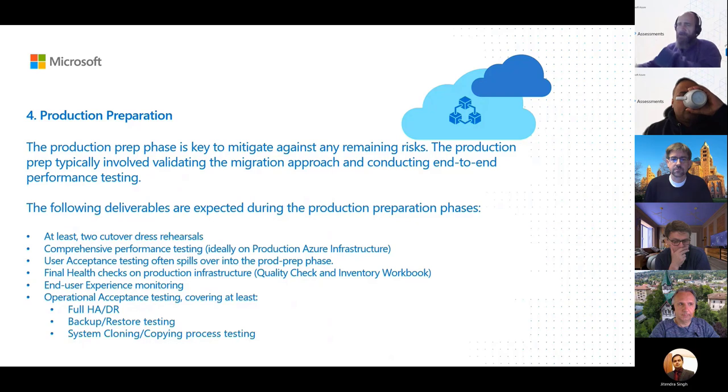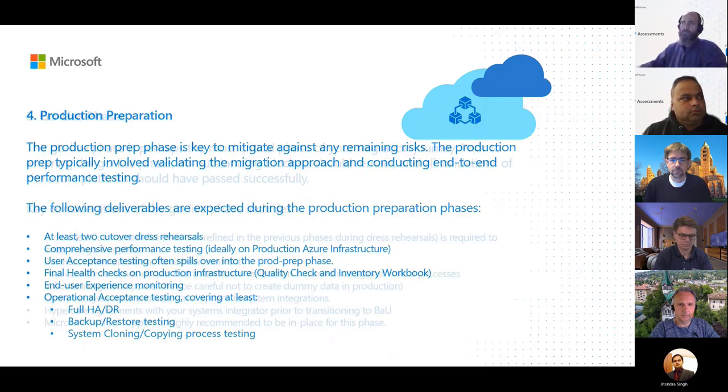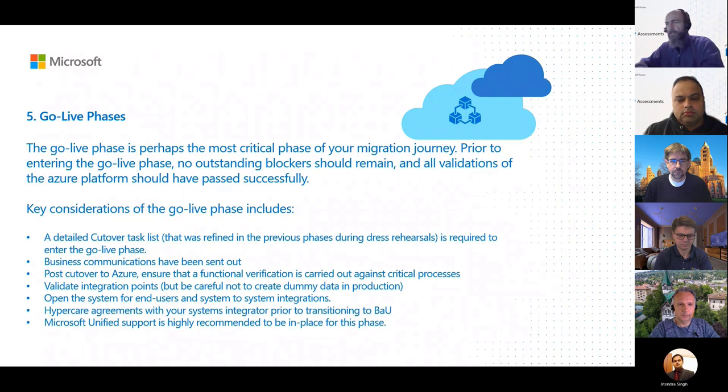So I guess one of the key things is the more you test, the better for any SAP on Azure migration. Of course, we don't have endless time and budgets, so we can't test everything, but we strongly feel, for example, that you have to at least do two mocks or two cutovers or dress rehearsals prior to your actual go live phase. And then this go live phase is obviously crunch time.